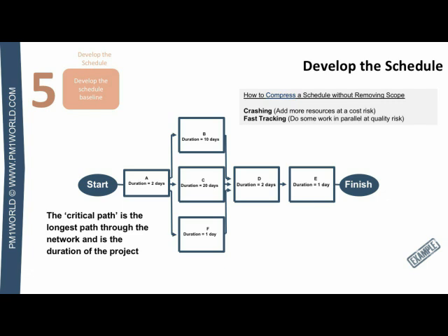The critical path is the sequence of activities that basically represents the longest path through a project. It determines the amount that the project will take in terms of duration. On any network path, the schedule flexibility is measured by the amount of time an activity can be delayed or extended past its date without delaying the project finish date.